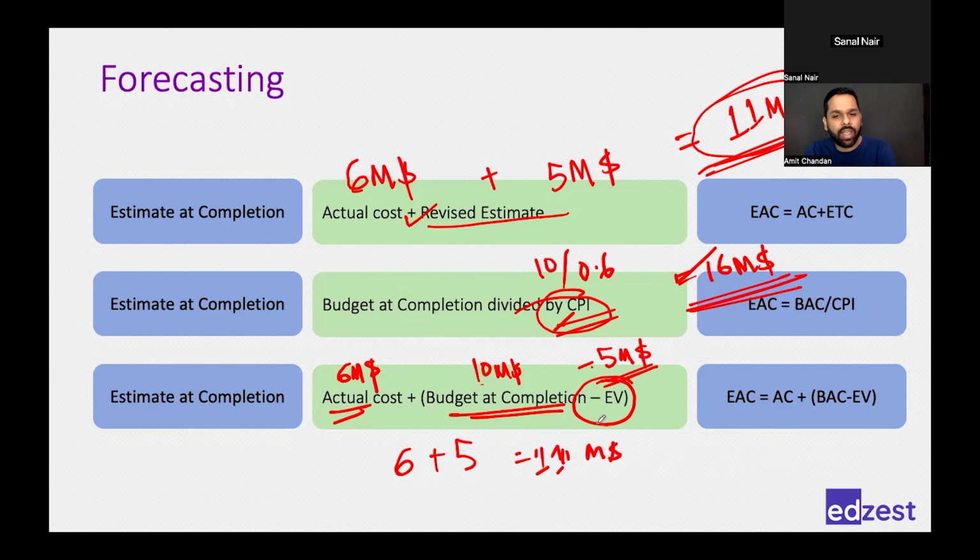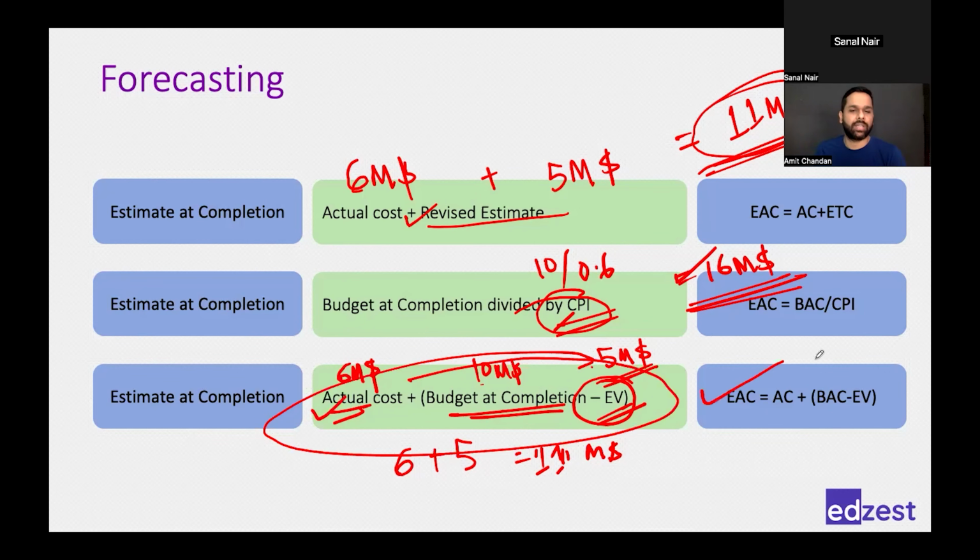Right. So my earned value till now, if that's the difference that I am receiving in my project, which means whatever I have earned till now is done. Okay. The same mistake will not happen in future. That is my estimate. I made a big mistake. There was an accident. The COVID happened. Some natural phenomenon happened. But that is not expected to happen in future also. So what is done is done. Whatever I have earned is earned. Whatever I have spent is spent. So I will use those formulas and I will decide my revised budget.